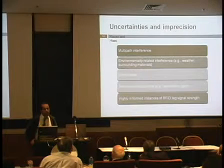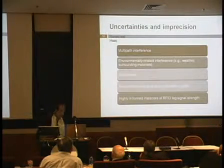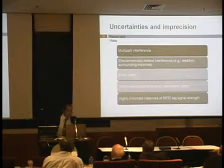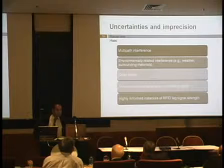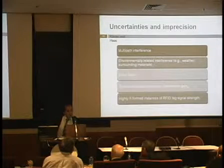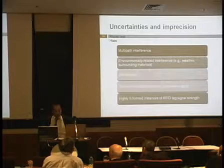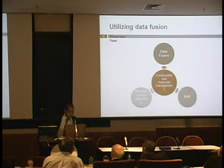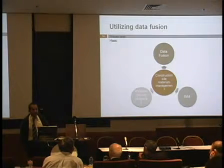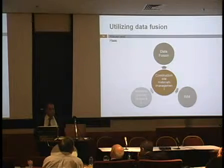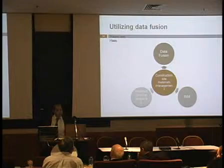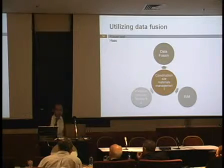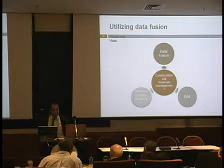Technologies are not perfect. There are always uncertainties and imprecision about technologies, even the most expensive ones. Some of the reasons behind these uncertainties include multi-path interference, environmental-related interference, dead space, antenna characteristics, and highly uniform instances of RFID tags. These were the reasons that the researcher tried to develop a data fusion model to reduce these uncertainties, using data fusion along with contextual information and sensing technologies to improve the construction site materials management.